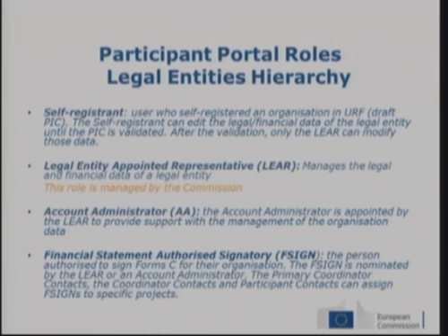If you have to change any legal data, it has to go through the registration facility module in the participant portal, because that will afterwards arrive at the legal validation service, which will validate it or not. Once they have validated it in their systems, it will be propagated to NEF, and you will see the changes in NEF.